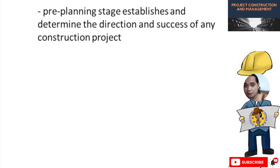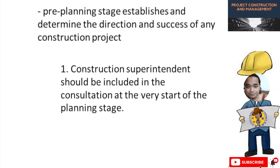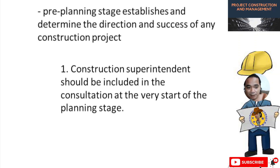The pre-planning stage establishes and determines the direction and success of any project. Number one in the pre-planning stage: the construction superintendent should be included in the consultation at the very start of the planning stage. The construction superintendent is the one handling jobs on the site, so it is very important that he or she is included from the restart of the planning stage.